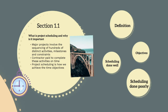To build a bridge, a new water treatment plant, or any piece of infrastructure for that matter, will involve completing hundreds of different activities in a specific sequence. All these activities will have different durations, interdependencies, and resource requirements, and any delays in the completion of one activity can have a cascading impact on any other number of activities.